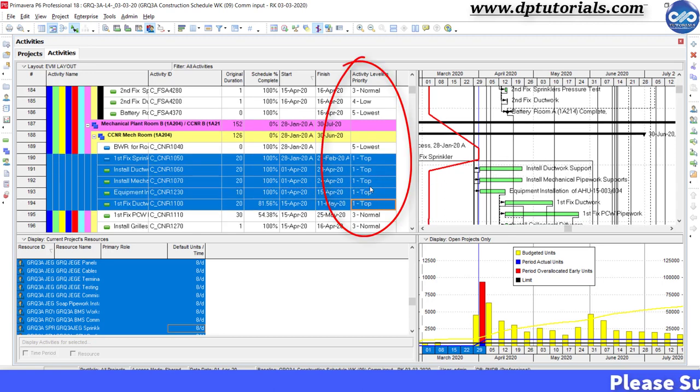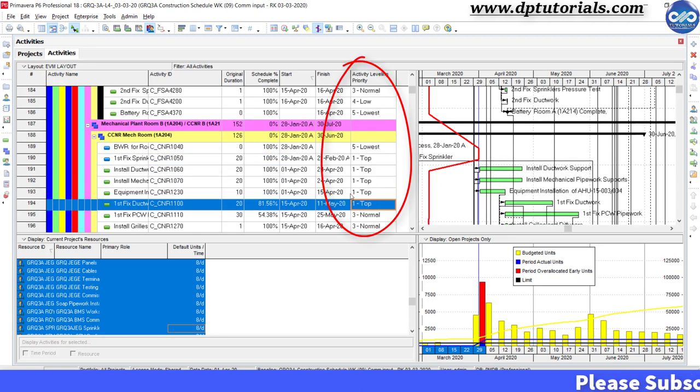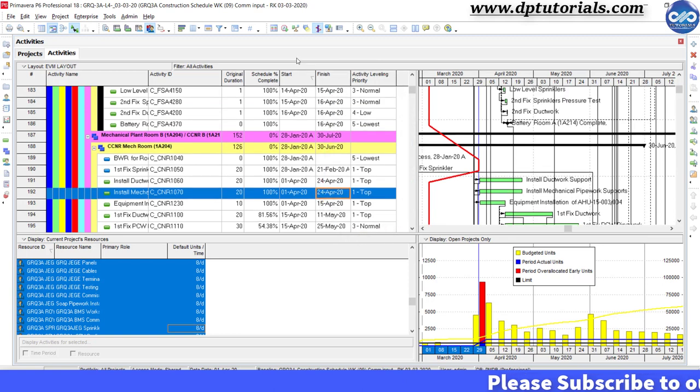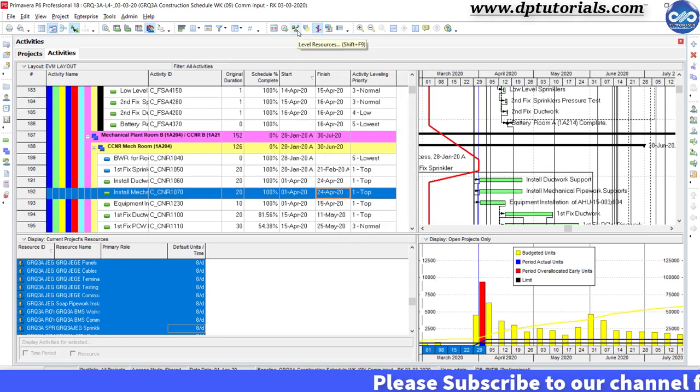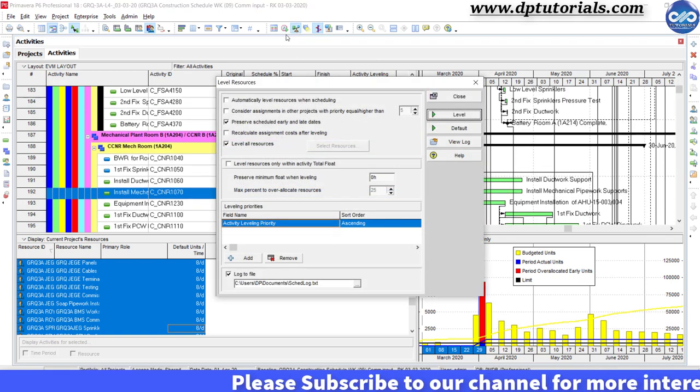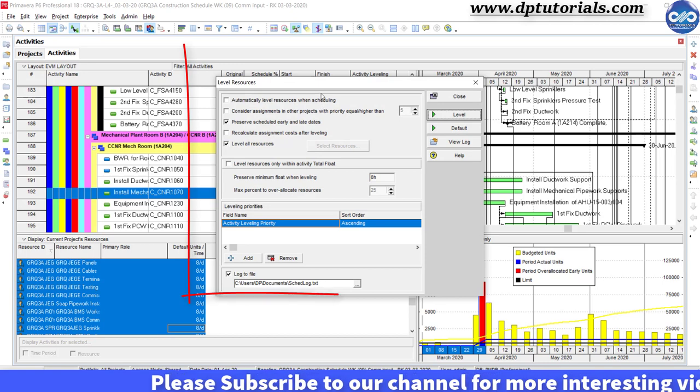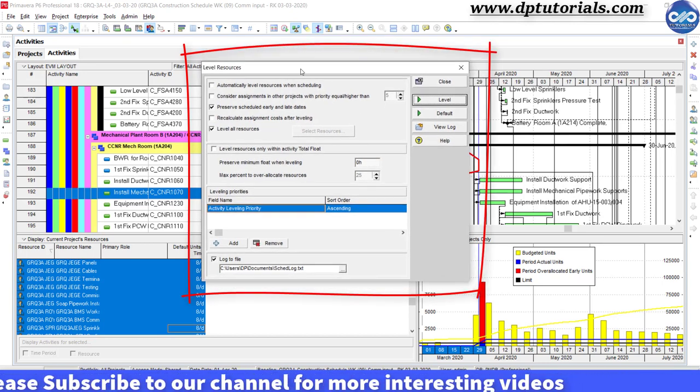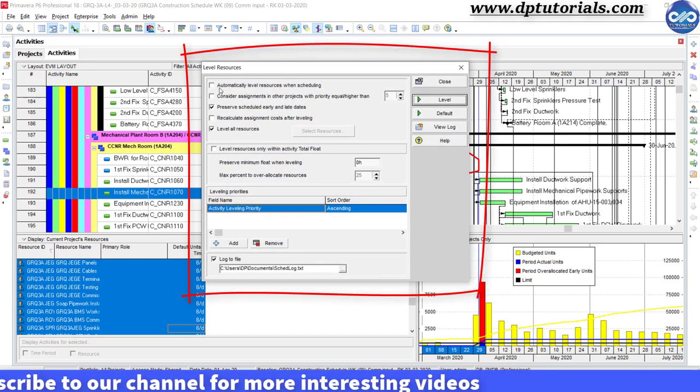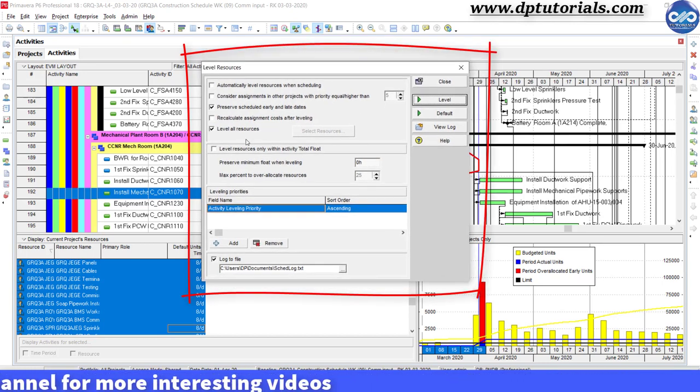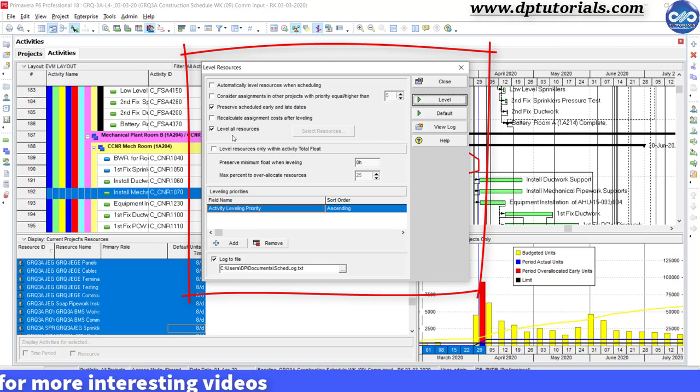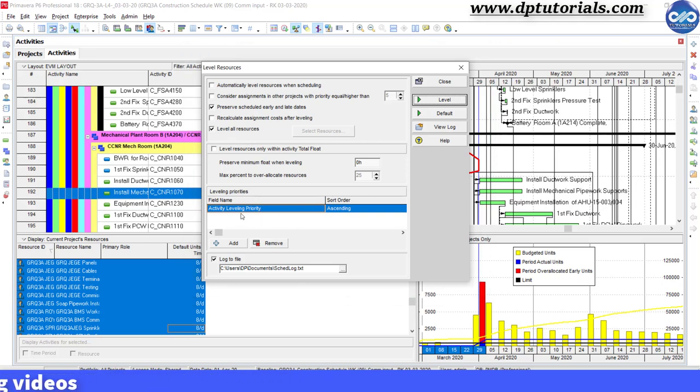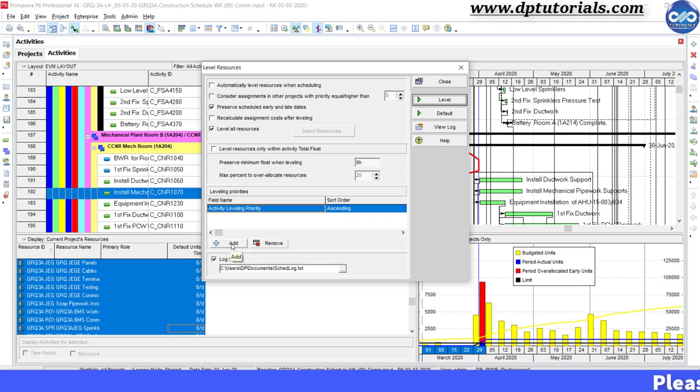Once you are done with the setting of priorities, click on this resource leveler icon from the menu bar. This will open the level resources dialog box. Here you can define parameters as per your requirement. In the bottom portion for leveling priorities, we are going to level our project using both its project and activity leveling priorities.